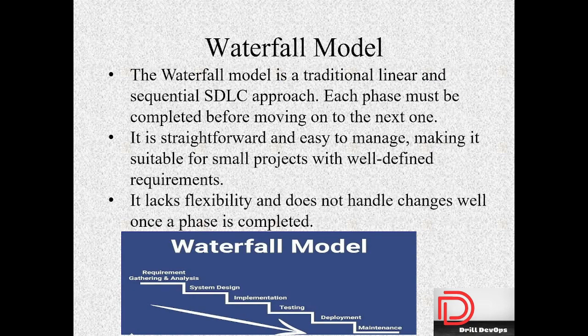We have to have clear-cut requirements without any changes until the application gets deployed to production. So if you have all bounded requirements without any change in the near future, then we can think of a waterfall model, because the waterfall model lacks flexibility and does not handle changes during the phase by phase completion.